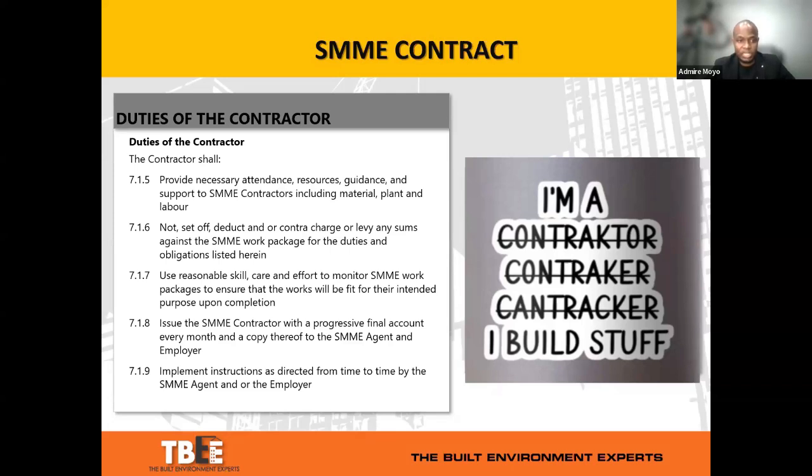So we've indicated that obviously there shouldn't be any set-offs or deductions and so on. All of those costs should be factored by the contractor in their fee, or where there are set-offs or deductions, those should be stated expressly in the overall layout of the documentation that's issued to the contractor as part of the SMME contract. And you can reflect that as an addendum or amendment of the agreement itself.